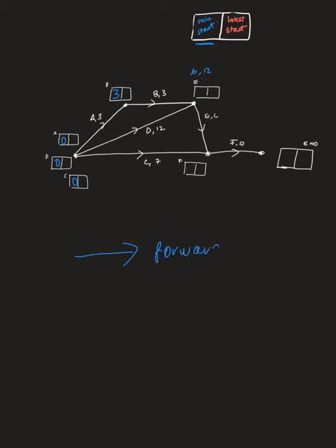So when you're forward scanning, we take the highest number, because we're looking for the longest path through the network. So 6 and 12, my highest number, if I've got a choice of 2, is 12. And then I keep going. All right, so now I've done E looking at F. So to start F is this checker box here.